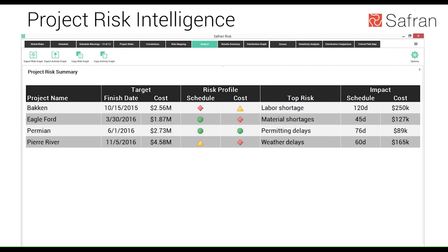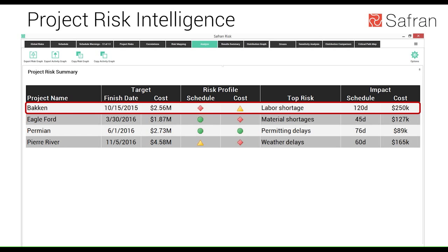Well, in many organizations, they have some sort of project dashboard, right, where they keep track of all their projects, the status of those projects, how they're performing, work done to date, key milestones, etc. Most of the time, they've got some view into risk, probably through a qualitative risk register, where they're assessing risk as having some sort of probability and impact on a scale of low, medium, and high, etc. Right? But it's difficult to make decisions with that information because it's all qualitative. It's kind of subjective in nature, and you don't really understand what the impact of that risk is against your project. So one of the things we've been discussing is how can we leverage the results from our risk analysis to better communicate these results with executives.